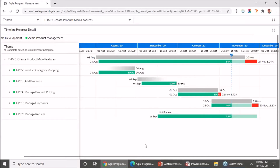We have given a planned start and planned finish date for our theme — that's the case when you've planned when things should start and end. But that may not always be the case. So we have also ensured that if you are only sure about a start date or only an end date, that visualization is covered as well. In this case, Epic 2 has only a planned end date — we are sure it needs to be completed by 30th of August. Similarly, another item only has a planned start date, with work kicking off on 1st of September. If you don't even have planned dates, you will see a 'not planned' legend and can still continue to track it.